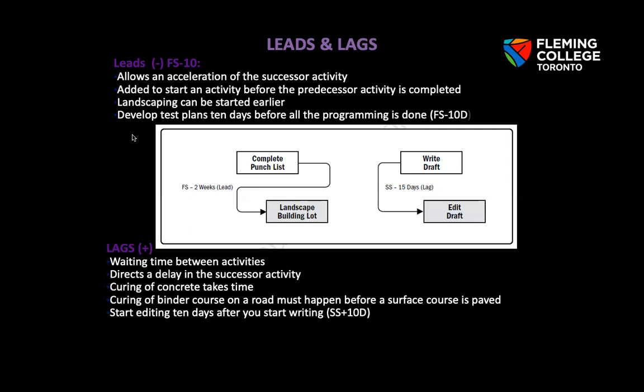All right, and there are some dependencies which have some soft logic which can be changed. Okay, so established based on best practices within a particular application area or some unusual aspect of the project where a specific sequence is desired. But these things must be documented, must be reviewed, also known as preferential. Okay, it is best to gather requirements before beginning design work. All right.